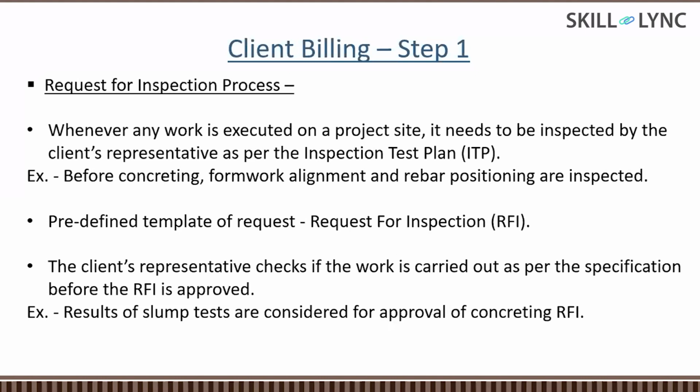Then the client will come to the site the next day. He will check whether everything pre-execution and post-execution has happened as per the quality, scope and specification. Say we are doing the concreting: he will check whether the formwork alignment is right, whether an adequate number of rebars are available, and whether the positioning of rebars as per the stress is right. Post execution, he will check whether the slump test was performed, whether the compressive testing of concrete was done, and whether the curing has been completed. All these details will be mentioned in the RFI document. A detailed template will be available.